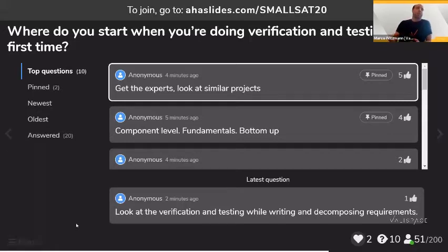If you're really trying to do it, then don't write the plan for someone, write it for yourself, right? Have an idea of how you want to go about it. Where do I want to store my requirements? How do I link my requirements to my test cases? What is actually a test case? On what level of detail do I want to describe the test case? Then is there a test procedure? Is that a similar or different thing than my test case?